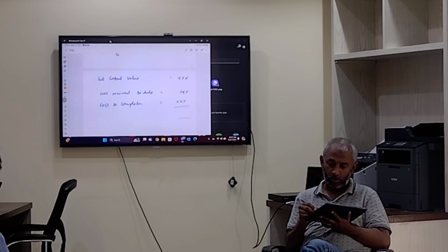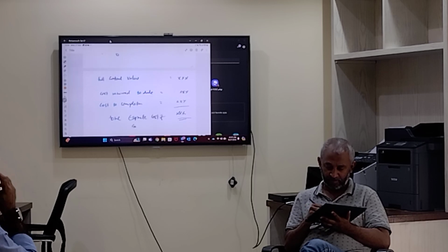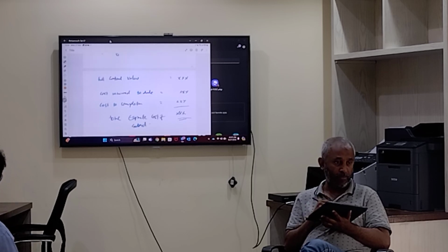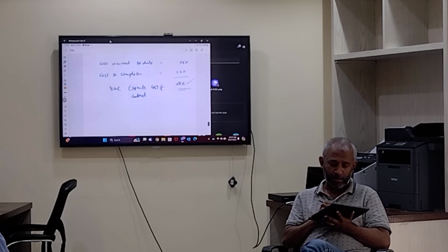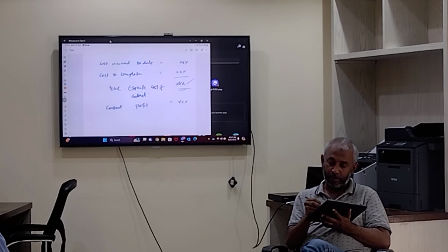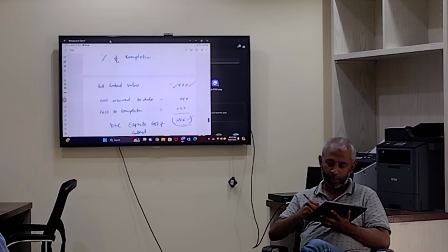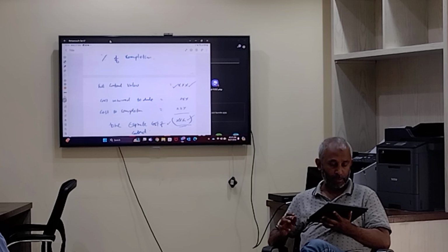So you will then know the total estimated cost of contract. Okay? And then you know the contract value, and then you know the total estimated cost of contract. Then this is the contract profit. What is the contract profit? This minus this.